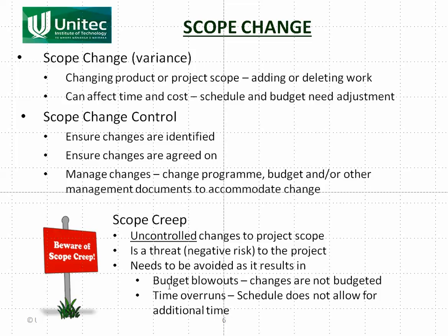It means that you are going to be spending more money, but the budgets will still stay the same. So it's going to look like you have blown out the budget. You will also be finishing later. So it looks like you have finished late, whereas in fact all that's happened is you haven't made an allowance for that change.